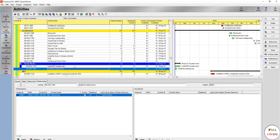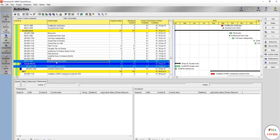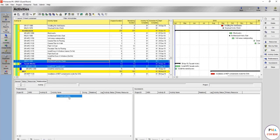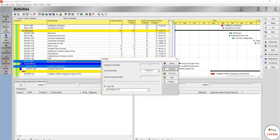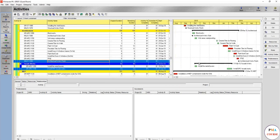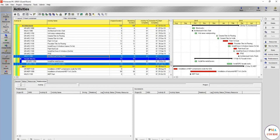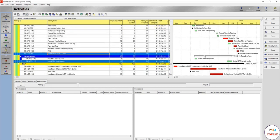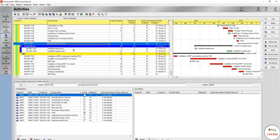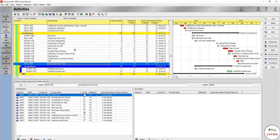Both of these activities should relate to our finish milestone, and the same goes for this activity. Now it's done. Run and see how it looks. Beautiful. This means you can start the metal louvers while doing the wet areas waterproofing. You might want to change this, maybe after the MEP first and second fix. There are a lot of issues you should check with your construction team. You can do a lot of works together at the same time.